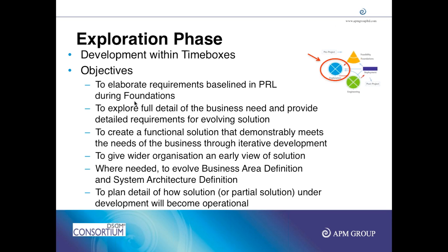We talk about the length of time boxes, which should be uniform throughout the project. So if it is 2 weeks, it's going to be 2 weeks throughout, and the length of a time box does not get extended if you have not completed the requirement. What I mean is, if I have a time box of 2 weeks, on the first day I define the targets for the time box. Each day, I track how I am performing against achieving the time box targets.